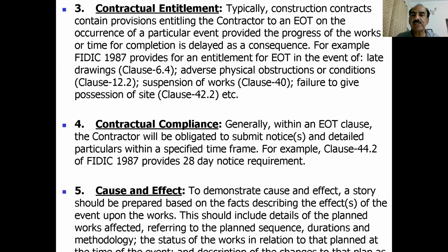The work remained closed for almost 1 year. And then when I joined as Vice Chancellor of the Procurement University, we tried to solve this. And this dispute resolution and this whole process might have taken almost 10 or 12 months. Now, this whole process was beyond the control of the employer also, because there was a law and order situation, and the local government, the Deputy Commissioner Office, advised the university to close the work. So under such conditions, definitely there has been a cause and effect relationship of this. This delay in the contract was certainly due to these facts.